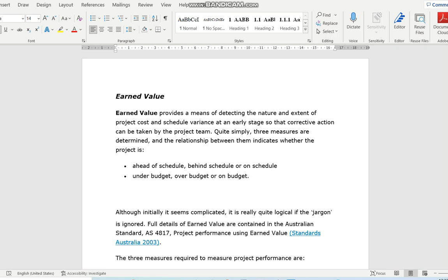But with the financial S-curve, we actually key in, at the end of the month, the actual cost of work that is being performed. Meaning that if you get the budget, that usually we base on claims. For example, claims we will base on the work that we've done and how much that is in terms of value proposed in the budget. So if that percentage is done and the work is claimed, the amount of money is the actual budget for that particular activity. If it's 100%, we claim 100%. If it's 50%, we claim 50%.